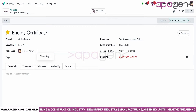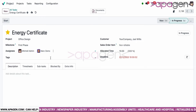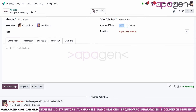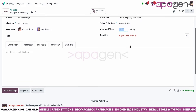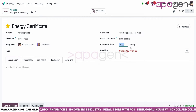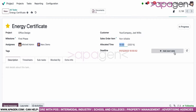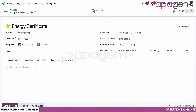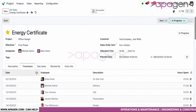The assignees field allows you to choose multiple users, and a specific time allocation for a particular task gives you the advantage of association during the planning stage. This effectively means you can draw a proper Gantt chart. The deadline field allows you to define a deadline as well as a start date — having both start and end dates gives you the option to generate a proper Gantt chart.